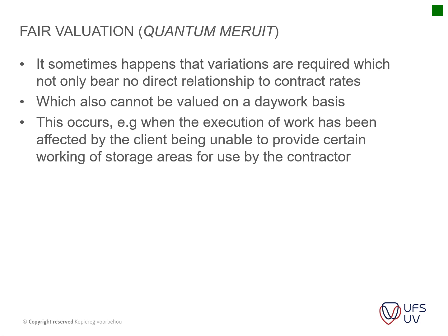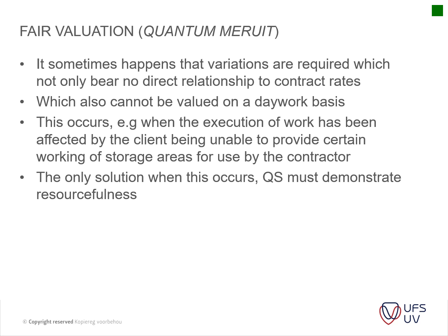And obviously these items and these rates are calculated at the discretion of the QS, the principal agent and the contractor, evaluating previous projects and comparing them to each other, or maybe phoning a security company and asking what a person like this would cost to be on site, etc., etc. The only solution when this occurs is the QS must demonstrate resourcefulness.